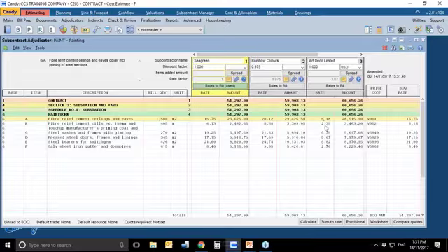So the rates are quoted in US dollars, but by virtue of the currency code that you allocated, the amounts have been worked out to AED. So now when you're comparing, you've got an apple-to-apple comparison. The rates are still in US dollars, but the amounts work back to AED. Now, if I decide to use Art Deco's rates in the bill, you will notice the total in the bill now is 51,207, which is the same as the total for Sea Green.